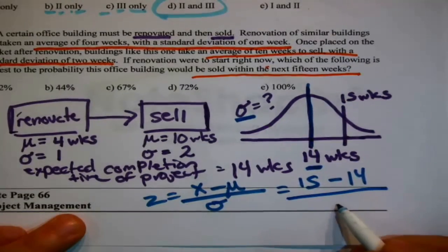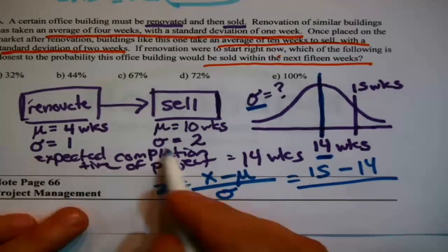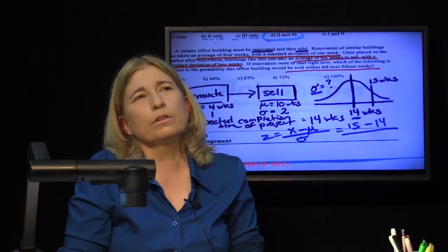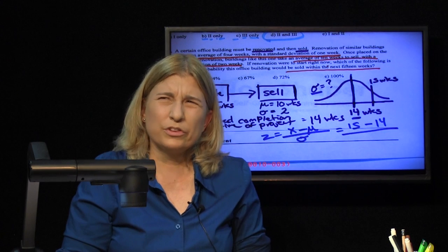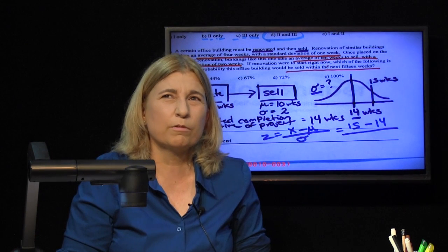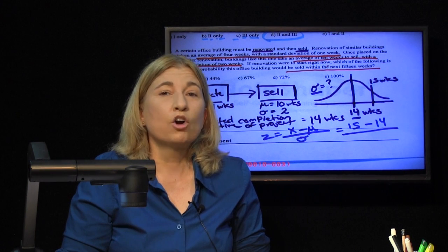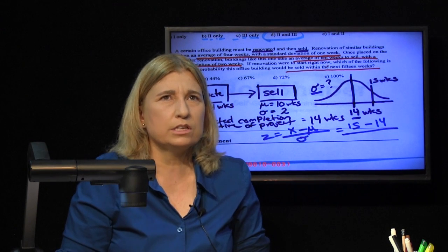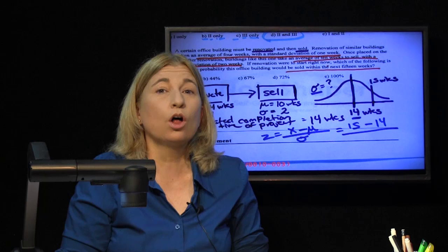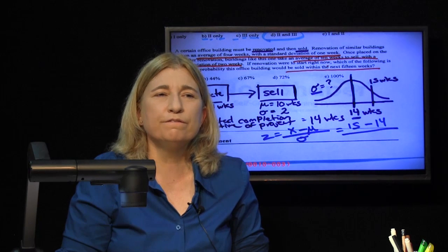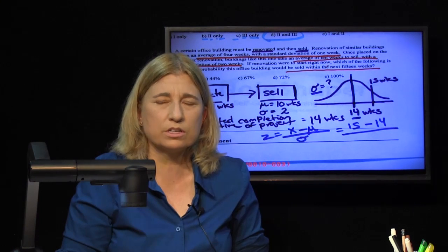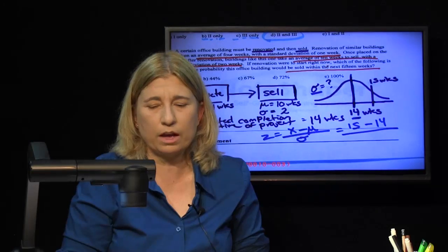Yeah, the problem is we don't know what to put in here. We have 2 different things here. We have to remember that when you were doing a z-score for a path, where did the standard deviation in the path come from? The variance in a path is equal to the sum of the variances along that path.